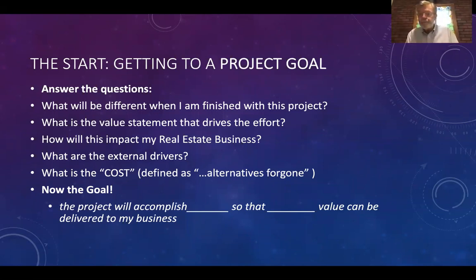So what's in the back of my mind? $200 an hour, minimum. $200 an hour is pretty much a fully burdened labor rate for a mid-level engineer. I know that like the back of my hand because I've used something like that up and down for decades. You need to learn what that is for you. So I calculate out what my time is worth, and it's worth considerably more than that in my high-tech career. And that's what I used as a cost model for, do I want to go to this meeting or do I need to frame this project? Compare the costs. That's what you do in order to create value in the project.